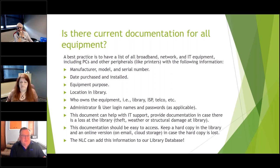I want you to start the process of just seeing where the network equipment is currently. What's nice is, by having all that information ahead of time before you start the E-rate process, we know what the outlay is going to be, how much it's going to cost. And depending on whether we have a conflict between your town's budget window and E-rate, maybe we don't get it done this year, but we know what the cost is going to be, so we can request it in the budget to cover that 30%, 20%, whatever is not covered if we do the E-rate next year.